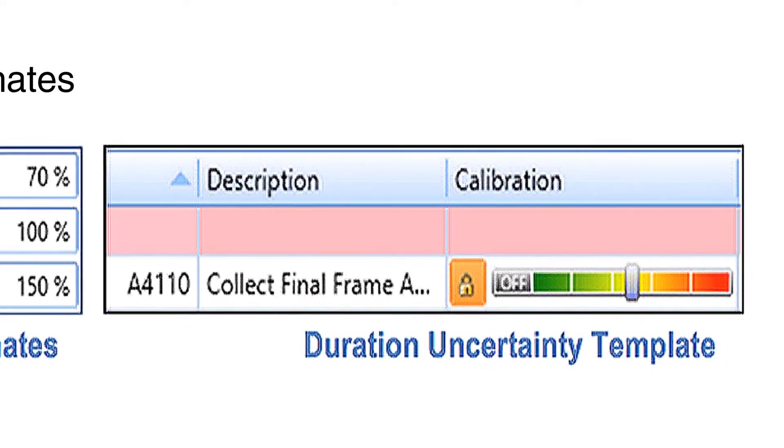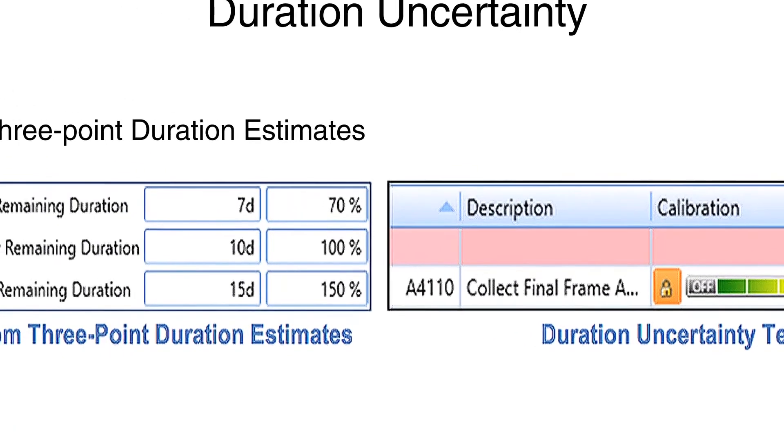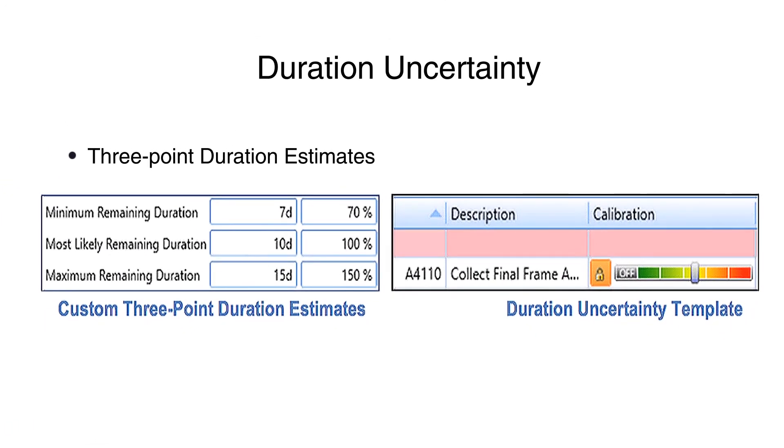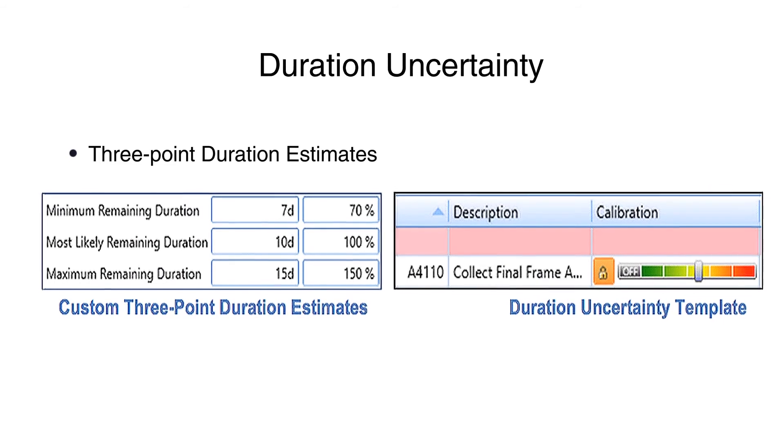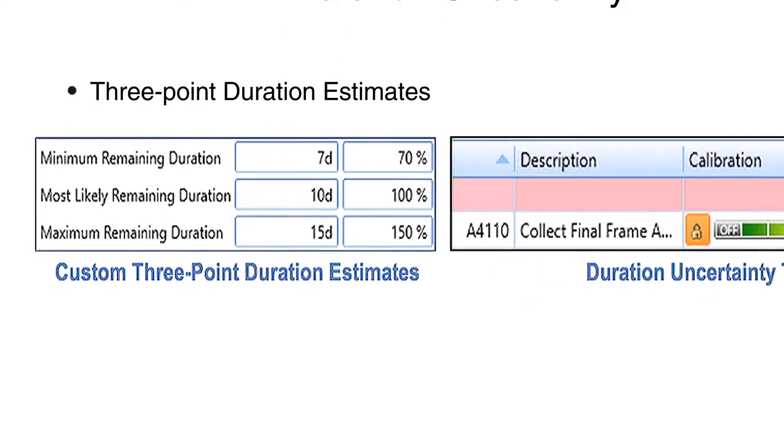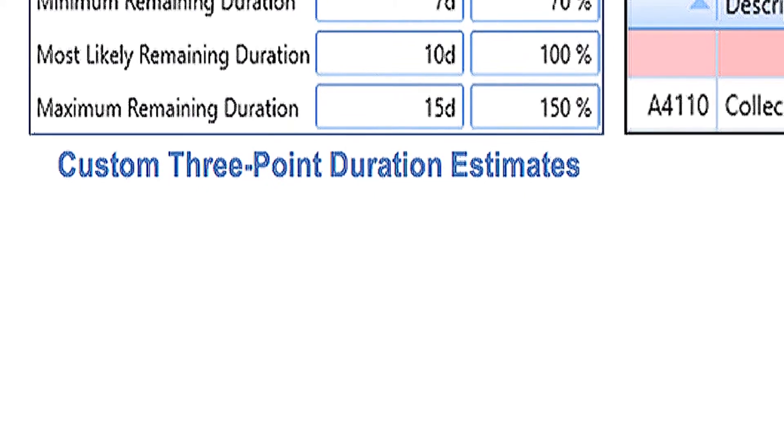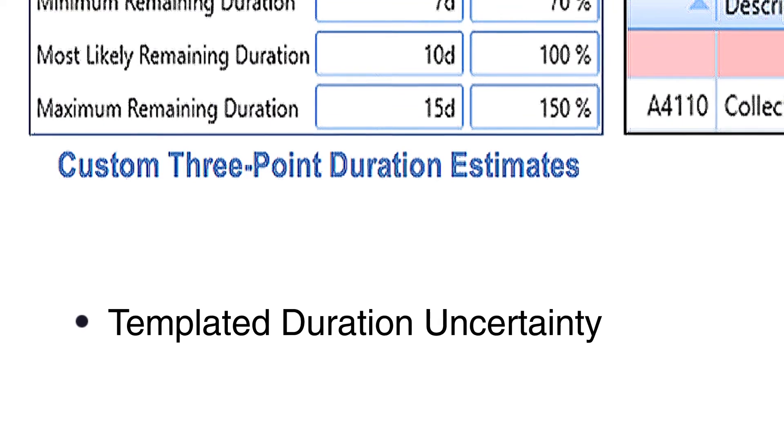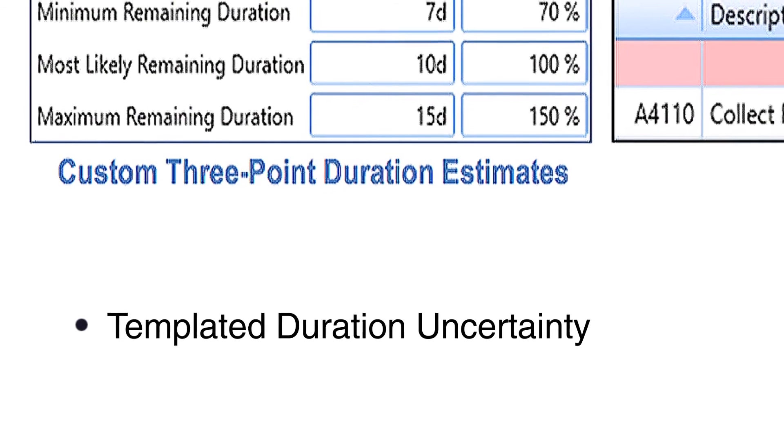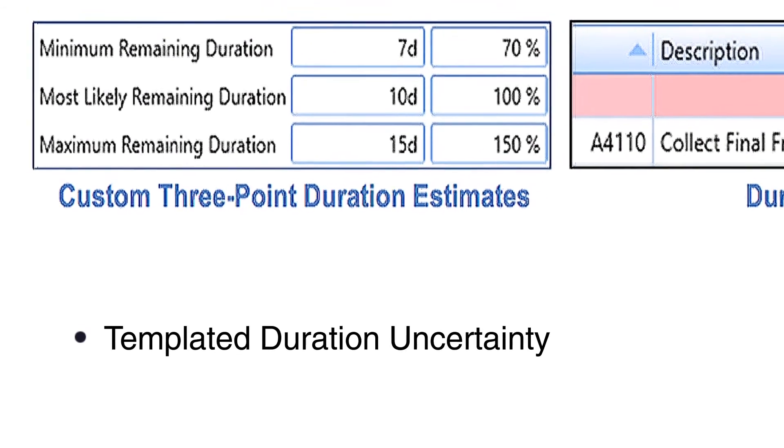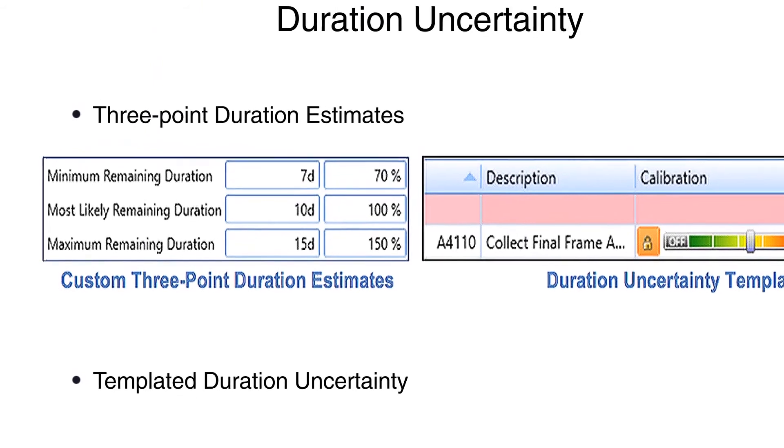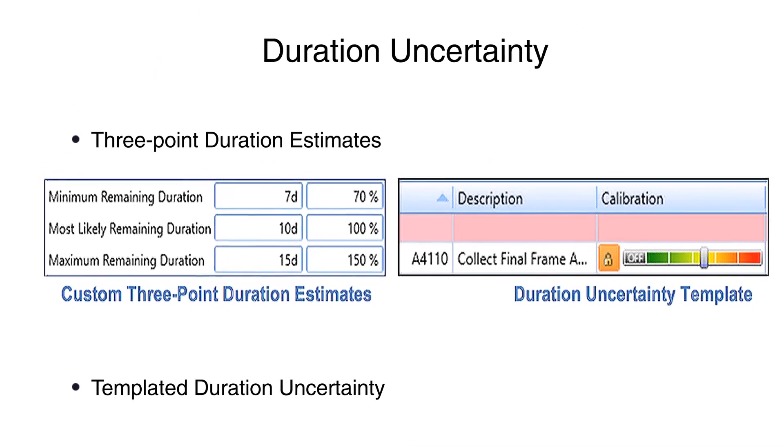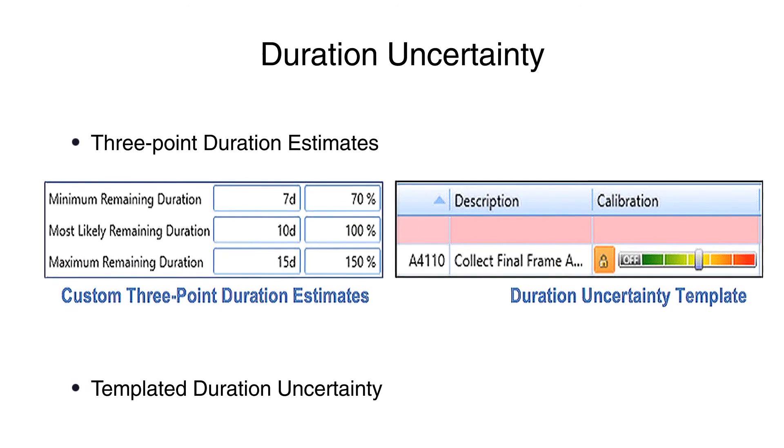Acumen Risk handles both methods very easily. Custom three-point estimates can be entered for each task in days or hours, or as a percentage of the current remaining duration of the task. Standard Duration Uncertainty templates are easily applied to a task by selecting the appropriate risk level on the calibration bar. To streamline the process, by setting the calibration at any summary level, the Uncertainty template is cascaded down to all the children tasks.